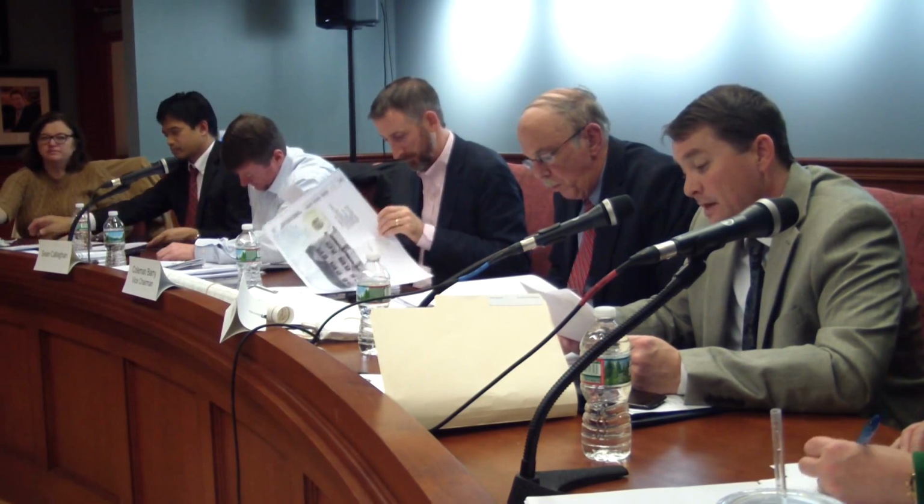Number 7, the applicant shall develop and submit a dust control plan to the Department of Health for review and approval prior to any site activity. Said dust control plan is to be implemented during any site activities to ensure compliance with state air quality regulations. Number 8, the applicant shall develop a rodent control contingency plan prior to the commencement of construction activities on site, which will include the name and contact information for On-Call Pest Control Company. Said rodent control plan shall be developed and submitted to the Department of Health for review and approval prior to obtaining their building permits. Number 9, upon completion of this project, the applicant shall submit to the Planning Board and Engineering Office as-built plans showing all utilities, building footprints, reference bounds, and benchmarks defining the total site, facilities, and right-of-ways. Plans shall be submitted in a digital format that is acceptable to the city.